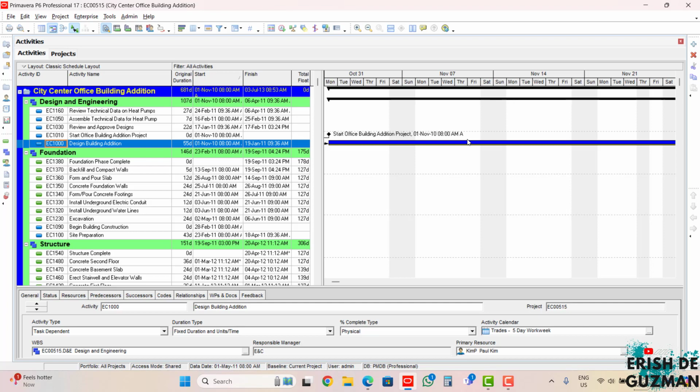Take note that it is not possible for users to apply different non-work periods for different projects or views, like other scheduling software packages, without affecting all other projects in a database. So this can become a problem with other projects that have different work periods. Let's say, for example, other projects need to have Mondays to Saturdays working days, while others are just Mondays to Fridays. So this issue can be solved by creating another database with a different default calendar.